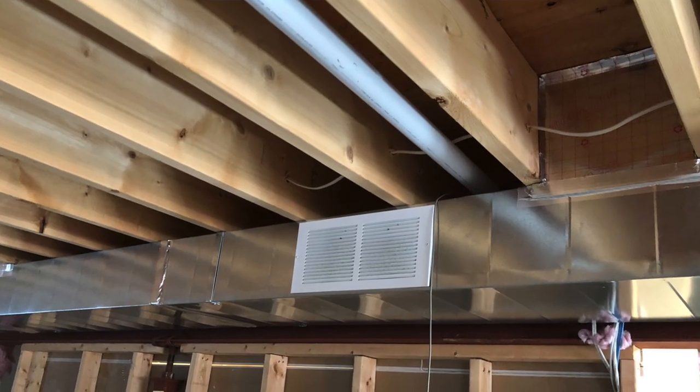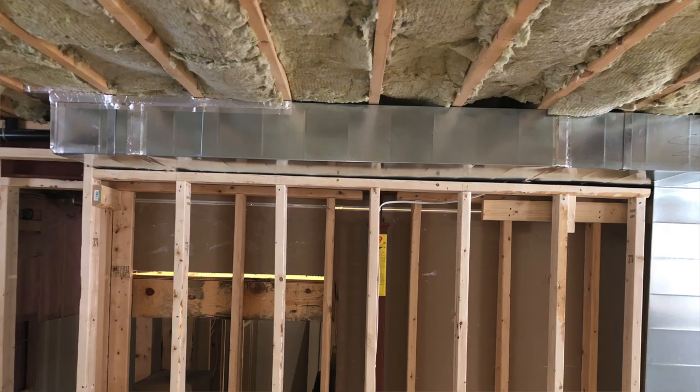Is there enough space between the stringer and the framing for me to slide drywall? What are the landing situations? That kind of stuff. And as I'm looking at the stairwell, if there's turns, am I going to be able to get drywall around these turns? Another consideration: how far apart are the ceiling joists? Are we going to be using resilient channel? What about soundproofing insulation? If it's 12 inches on center, I'm going to be running resilient channel, and then I'm going to have to cut all the soundproofing in half if I'm getting 24-inch wide bats and tucking that in.